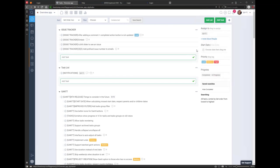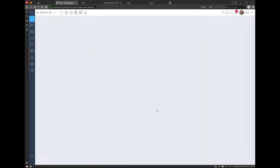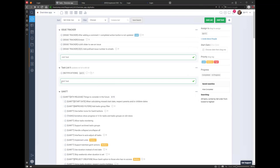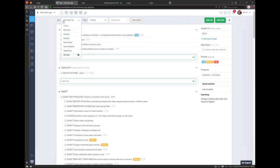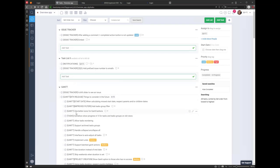Task lists are kind of like project groups for projects — very easy to rearrange. For tasks, if your sorting order is set to 'set order,' you'll have grey drag handles next to tasks, which means you can drag and drop tasks between task lists. So if you want to organize your project visually, you can create your task lists. For a short project you probably just have a default task list. But generally people rename them — it's much easier to absorb tasks like development tasks, test tasks, design tasks.